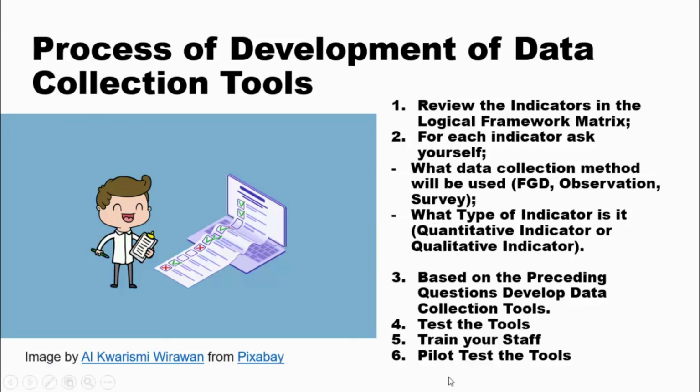Then the most important step is the pilot testing of the tools. You use these trained staff, you ask them to go into the field to interview just a small number of individuals. Based on the data, you can establish whether the tool fulfilled its intended purpose or not. If it didn't, then you need to make corrections. And after you've made the corrections and improved the tool, you actually launch the tool.